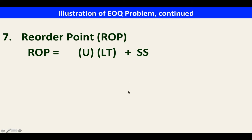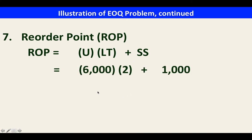For the reorder point, the formula is: usage × lead time + safety stock. With usage of 6,000 units per week × 2 weeks + 1,000 safety stock, the reorder point is 13,000 units.